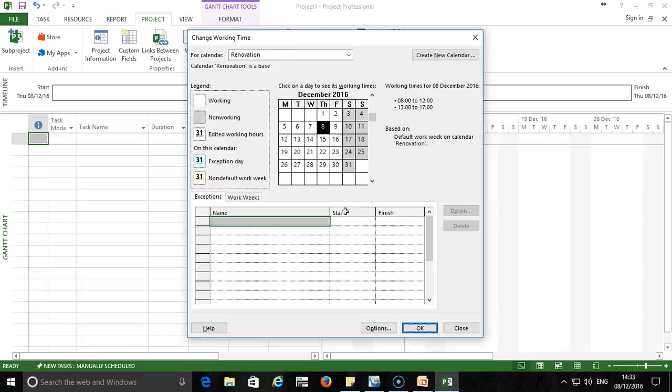But then if I assume that my project started on 1st of December, then I could clearly see that there are some exceptional days. And if this project is carried out in a country like Finland, for instance, I have some days that are holidays. For instance, the 6th of December, that is Independence Day, and the 26th of December also is a holiday. So what I am going to do now is to put these days into the system as non-working days, because as you can see clearly here, only the weekends are non-working days.